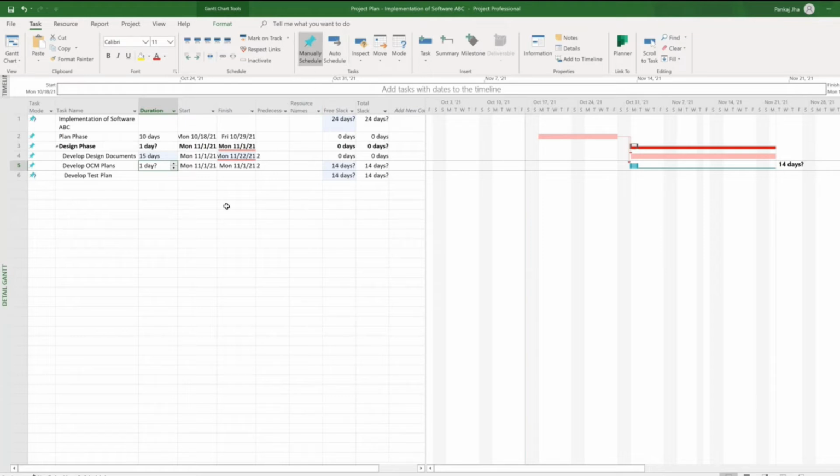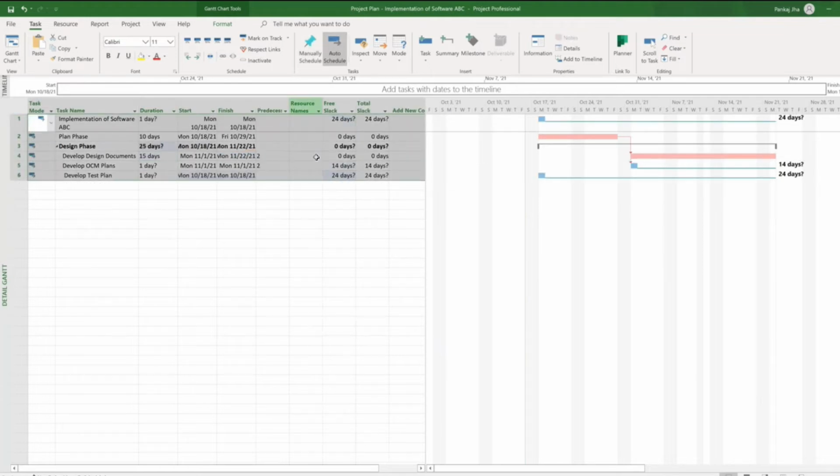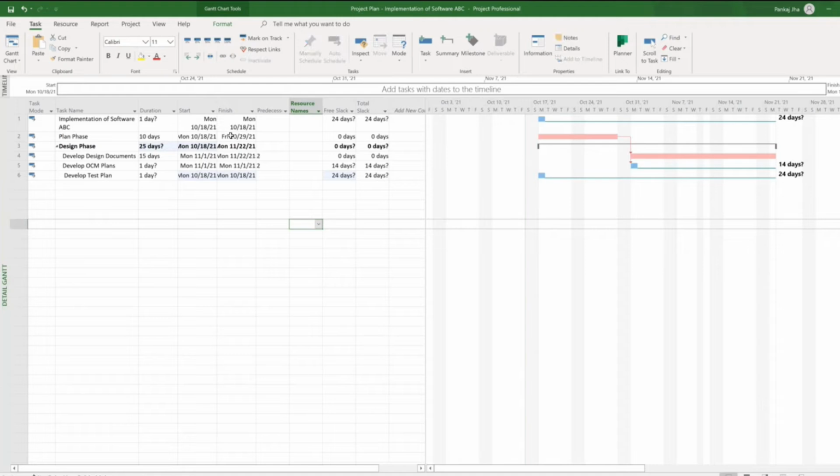So we should do an auto schedule for the task, because when we do an auto schedule based on the predecessor, automatically the subsequent task start date and finish date changes. So it is always recommended that when you prepare a project plan, you should have all your tasks auto scheduled and have dependencies defined. So we'll select all the tasks and change to auto schedule. You saw the red underline, the finish that has gone, right?